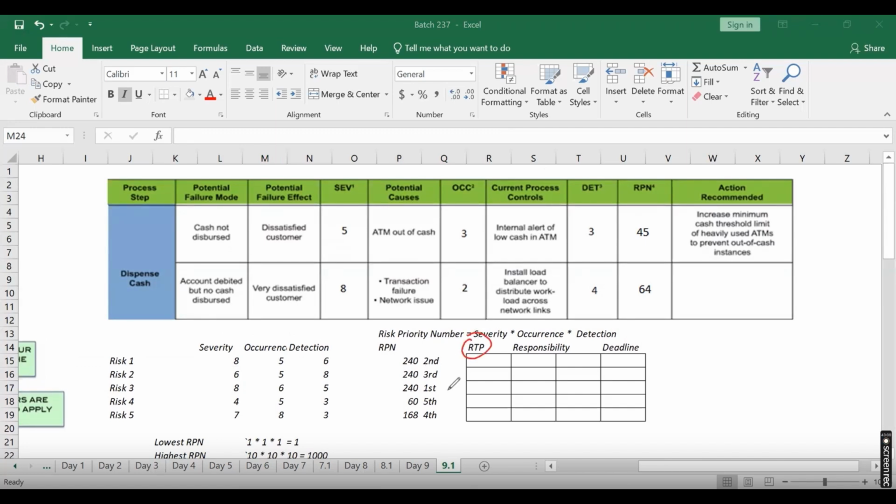A common methodology, whenever we go, we always use a three-layer action plan. Not 1, but 3-layer action plan. You just can't sit down and say, okay, let's start the discussion. No, you have to have a discussion with your team on 3-layer action plans. And whatever action plans you decide, you will assign somebody responsibility because somebody has to implement that action plan, with the deadline that by so-and-so date, you should complete this action plan.